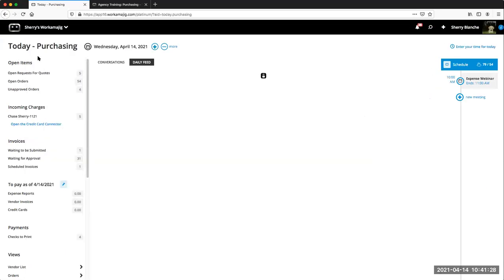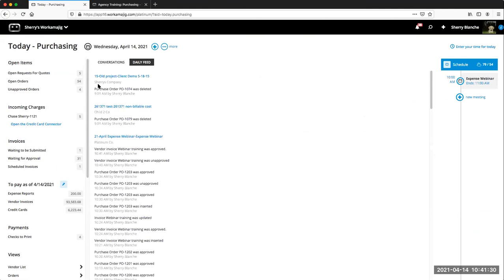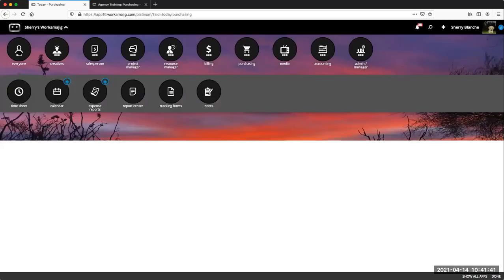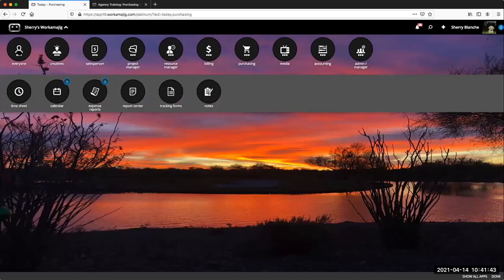Okay, so again, miscellaneous costs, just for those expenses you've already entered as overhead expenses, and now I need to relate part of that to a project to bill back the client or associate the cost to that project. Now, the expense reports I'm going to do, and then credit card charges. The expense reports are under the Everyone tab because often it's based on employees saying, hey, I paid for this out of pocket.